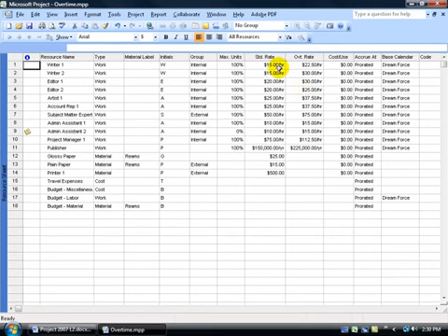So we have our standard hourly rate for Rider 1, which is $15 an hour. And then if we hold to the standard of time and a half, then we have 15 dollars plus half of that equals $22.50. And of course you can type in whatever you want for the overtime rate, but again, if you want to adhere to the time and a half, then go ahead and type it in. It won't flag you if you go beyond what you have here. For example, with Rider 2, it's double time, $30 an hour instead of time and a half.